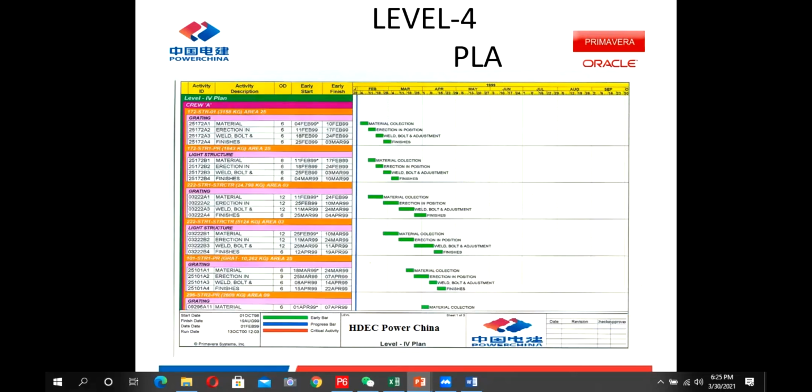He tells you this is my start date, this is my finish date, you have to do this project, this is your scope. Then our bidding team works on it, and they produce a level 2 schedule, saying we will finish this area, this area, this area on this date.